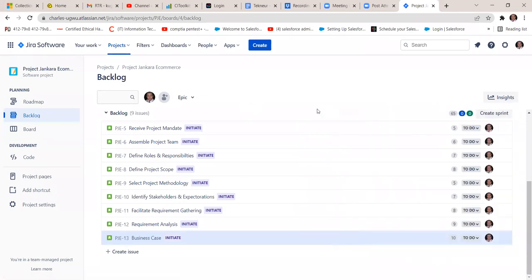So allow the developers to choose whatever they want to, whichever one they feel they want to start with. Not you, the project manager, assigning it to developers. But you have to watch and see them take the one they feel they have to start with. That's how we assign it to people who they believe should do this one. That's why we call it a cross-functional team.